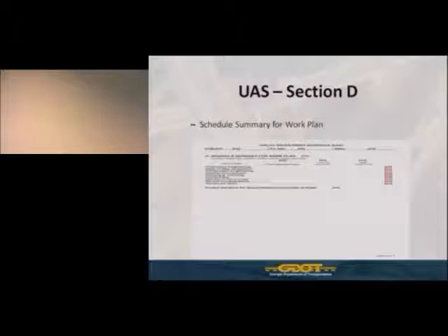Now, if you notice in columns 33 and 34, you'll see it says prior to utility NTP and after utility NTP. And utility NTP is red there. That also is a change made by the Utility Liaison Committee. That used to say project award, prior to project award, after project award. We felt utility NTP or notice to proceed was more appropriate given how we do issue some notice to proceed prior to award of a project.